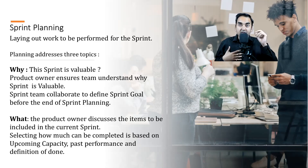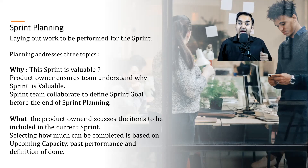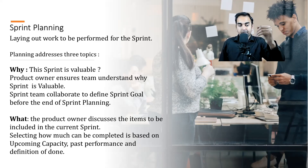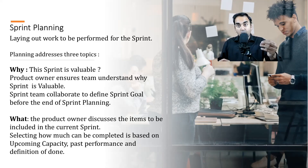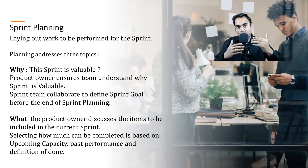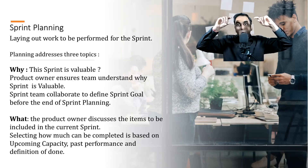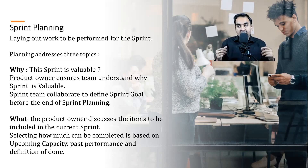The product owner answers why we should take a specific feature and what the ultimate goal is for this sprint. The product owner ensures the team understands why the sprint is valuable, because once they understand it, it becomes easier to overcome any obstacle. The scrum team also collaborates to define the sprint goal before the end of sprint planning, so you should leave knowing not just the list of items but also what you're trying to achieve.